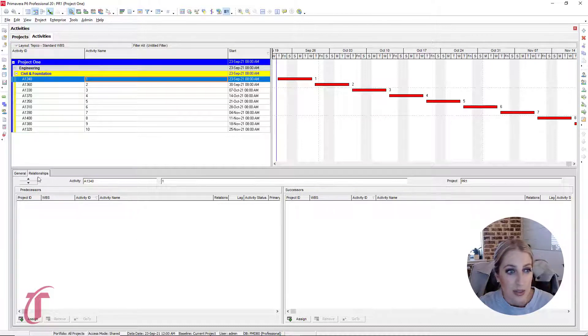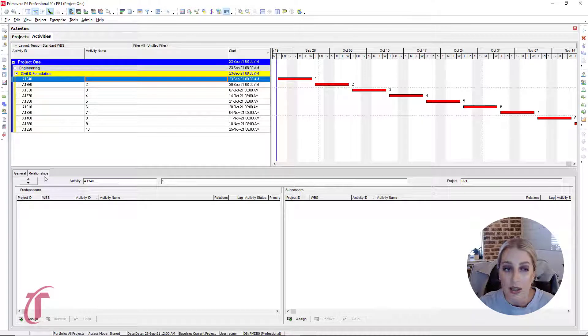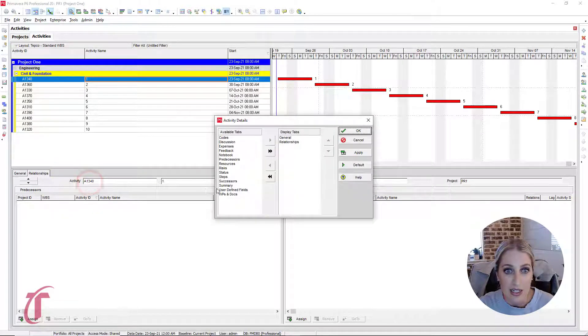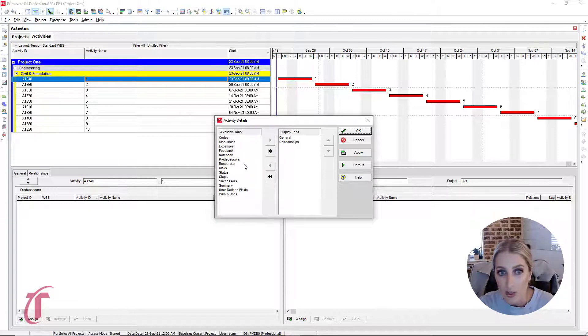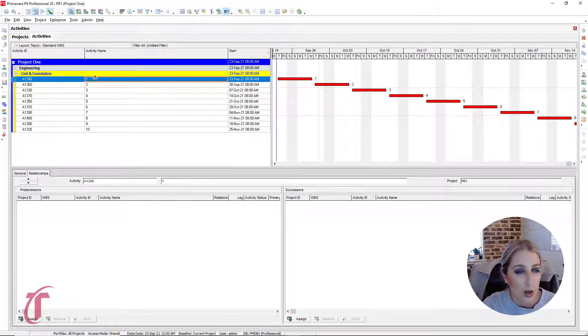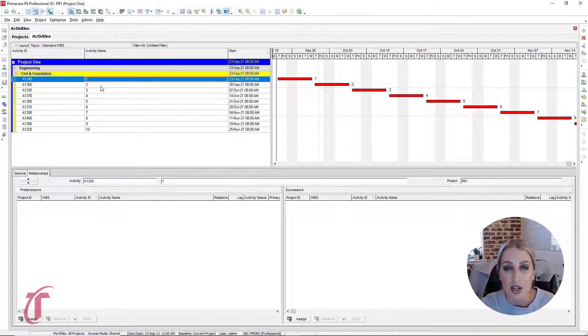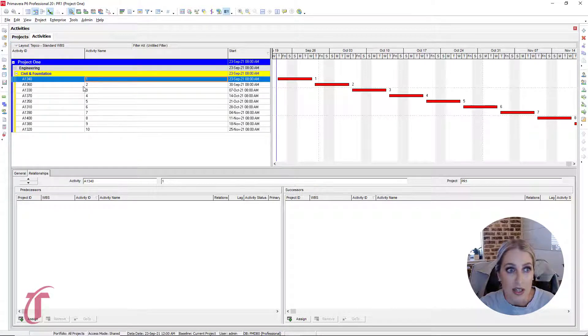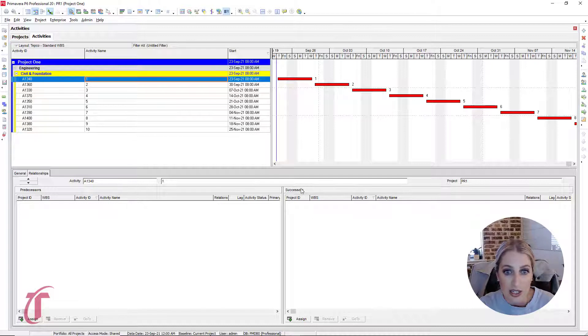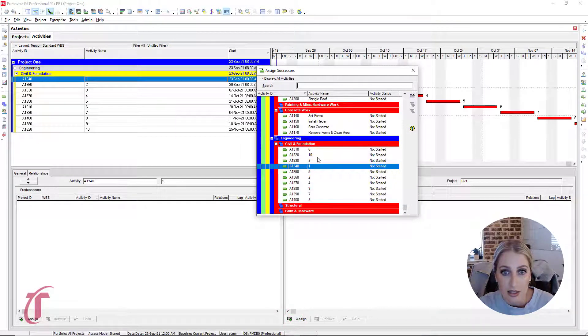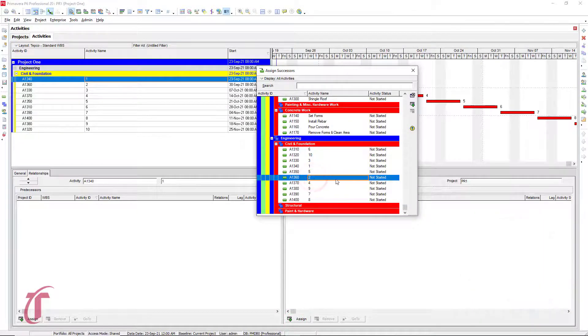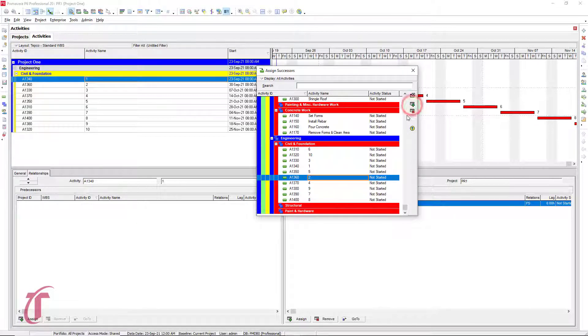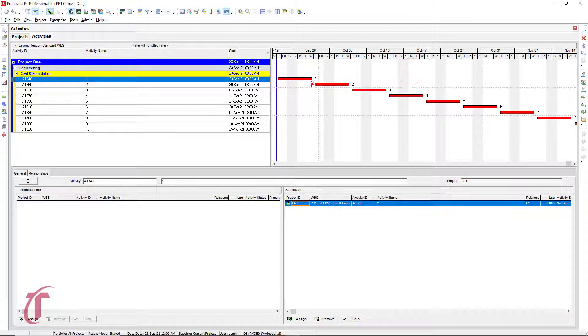And if you don't see this relationships tab at the bottom, just right click, customize activity details, and all of the columns will be available right here to choose from. So what we can do is we know that one is our starting activity, and we need the successor to be activity two right here. So in our successors box that we see on the bottom right hand side, we can click assign. And so we select two, you can either double click it or press that green plus sign right there. And so we see that we have now linked one to activity two.